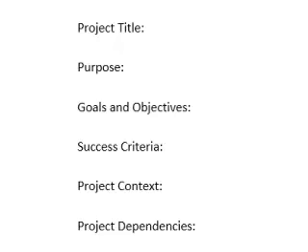So the project context, keep in mind the context is how does it fit into the bigger picture. So updating the computers, it has to be done before fall term. So the context is time limited. You have to work around things that are happening, whether it's current instruction, updating buildings, upcoming terms, limited hours. So there's other things that are going on that you have to take into consideration. They're part of the decision-making factors.